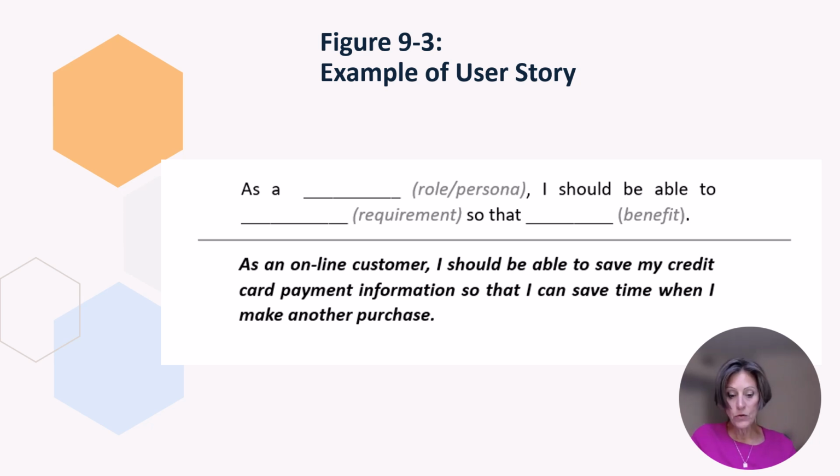Based on the set of customer requirements, the product owner will establish a set of user stories in priority. Priorities are based on several different elements. For instance, the value that the feature will add to the product and to the business may increase the priority of the user story in the product backlog, indicating that it should be completed during an early iteration.